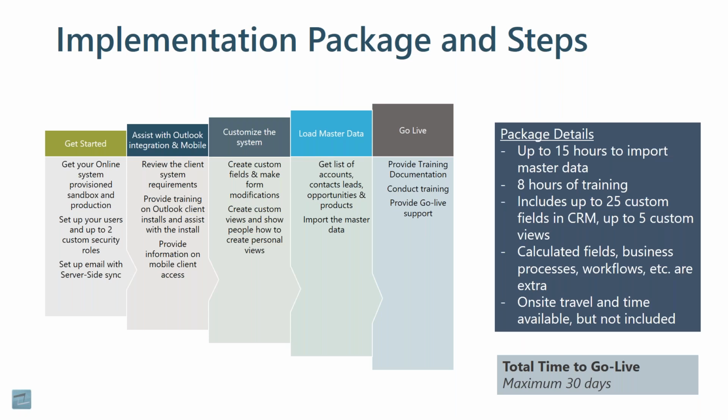And just a couple of other additional details. So 15 hours to import master data. So we do keep a cap on that. If it's taking more than that, we're probably working with data that needs a little bit more work, or maybe we're running into a circumstance where we may need to look at additional import capabilities. But we're working with out of the box, and if we're taking a little bit more than 15, or we're expecting that, that's where we'll have that conversation. But that's where we try to keep that cap. 8 hours of training, 25 custom fields. We mentioned that already. 5 custom views.